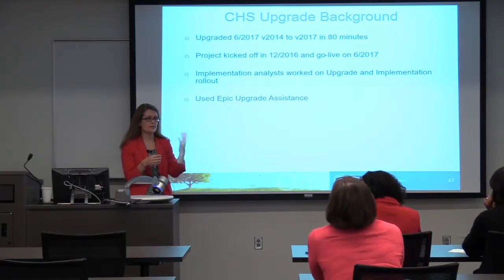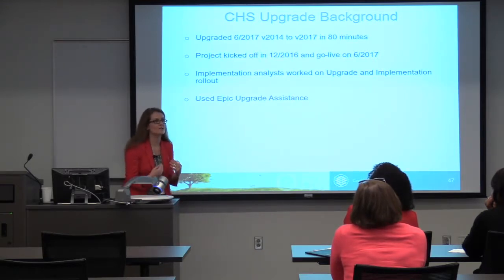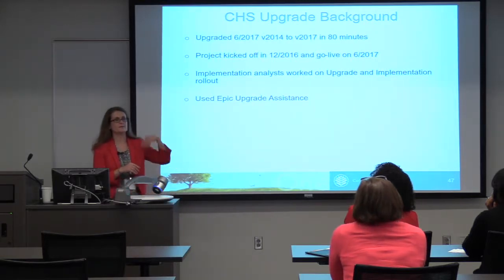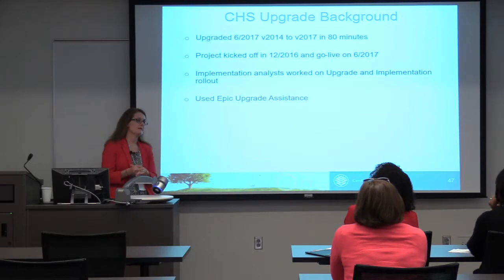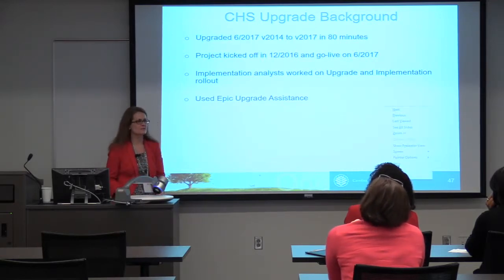Number one, because we're hearing from operations and we're hearing from the customer and our stakeholders, what do you need? What do you want? How can we make it better for you so that you're not wasting all this time asking the end users the same questions every time they present, for example. So I definitely don't think we shoved it in. I do feel like we followed the steps: design, build, test, go live. So I think we were definitely much more not rigid PMBOK, to say the least, but definitely more structured.